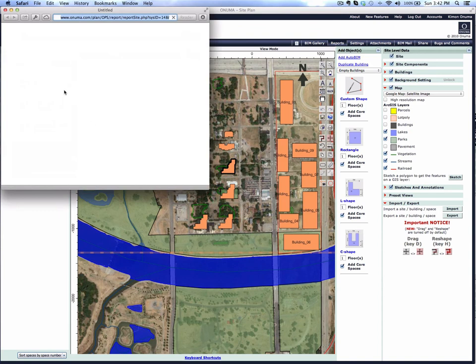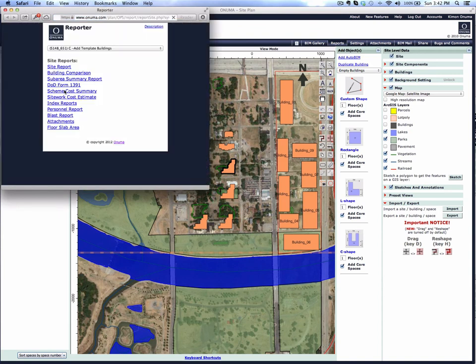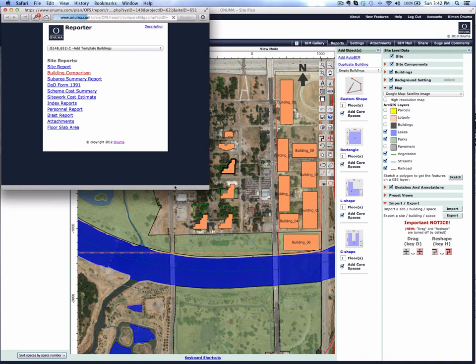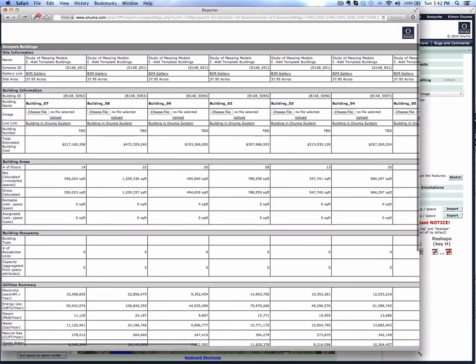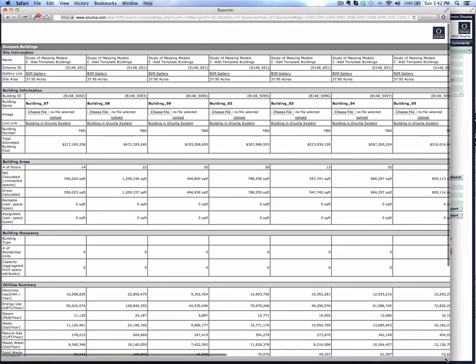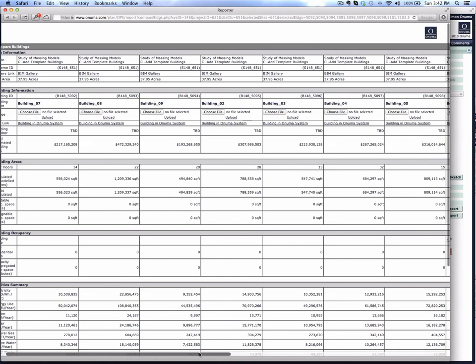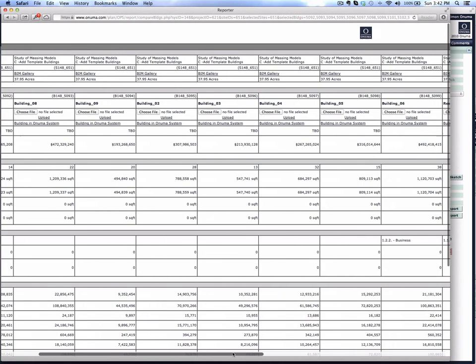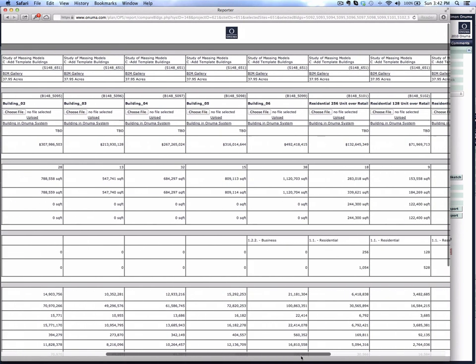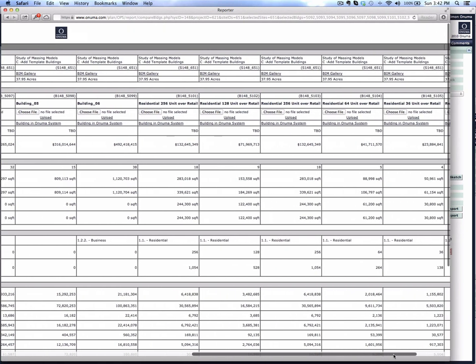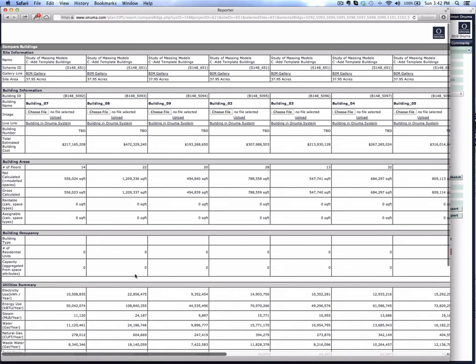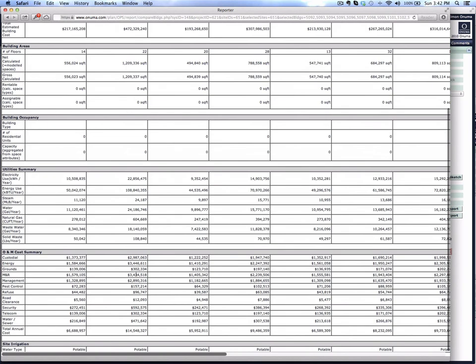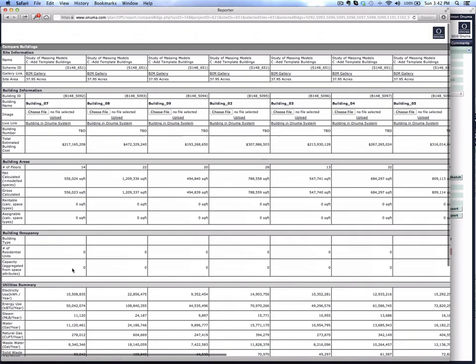If you hit the report button, you can do a building comparison report, and it lists all the buildings side-by-side with projected construction costs, total areas, total energy use, and year-by-year operations and maintenance costs based on defaults. These can all be adjusted. The assumptions can be adjusted, but these are just working off of the initial assumptions that are preset in this particular scheme.